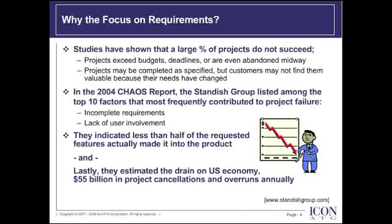On a relatively positive note, the 10th edition of the annual KS Report from Standish Group released in 2004 indicated that project success rates have increased to 34% of all projects — that's more than 100% improvement from the success rates found in the first study in 1994. When asked for the chief reasons for the success rates and why they've improved, Standish Chairman Jim Johnson said the primary reason is the projects have gotten a lot smaller. Doing projects with iterative processing as opposed to waterfall method, which calls for all project requirements to be defined up front, is a major step forward.